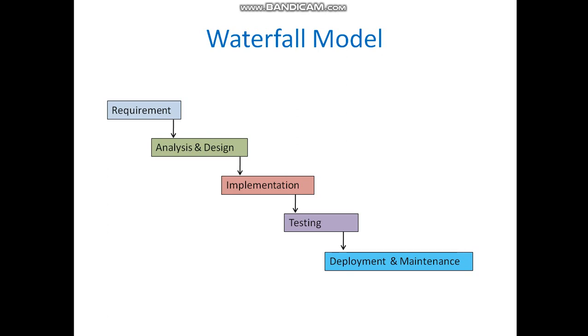Once the work is over, it will be handed over. There is no scope of communicating back to a previous requirement. This is actually the basic disadvantage of the waterfall model. However, this model consists of all the phases which help to develop software, so it is applicable only for systems where the requirements are static or frozen and the size of the system is small.